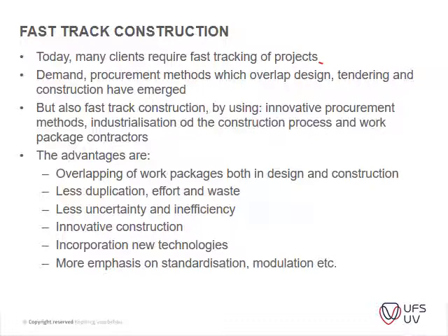It becomes provisional because the design isn't done, and only during the appointment of the contractor is the design finalized. Okay, but fast-track construction can also use innovative procurement methods, industrialization of the construction process and work package contracts.